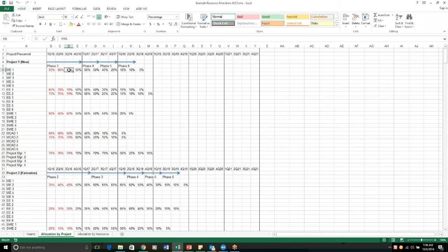And in terms of collecting this data, it doesn't have to be really heavy-handed. I mean, you could implement some type of a time card. I don't think it's necessary to do that on a daily basis. Again, the scope of the project is going to drive how often you collect the data. When I did this, I was collecting data on a quarterly basis, but we did weekly accounting. It was basically just asking the resource to go back over the course of the week and get a rough estimate of how much time they spent on the various projects. So you don't have to go really overboard in terms of collecting this data.